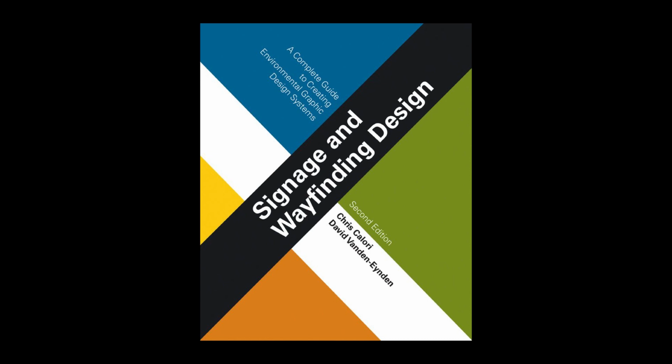The kickoff meeting helps set the stage for an efficient observation phase, covering such items as the expectations and responsibilities of all parties, identification of any potential problem areas, identification of coordination points and processes, definition of project communications protocols,